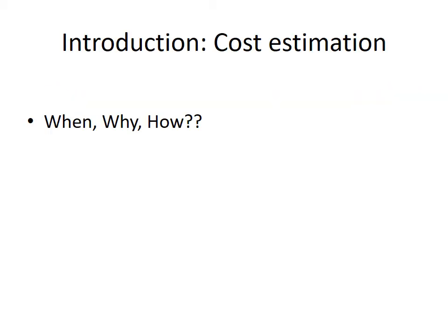And when we are performing this cost estimation, in the software development lifecycle, the first phase is requirement analysis. In the requirement analysis phase, we already analyzed the functional and non-functional requirements, and all of these will be stated in the form of an SRS document. Once the SRS is finalized, the next step is project planning, and project estimation is a part of this project planning phase.